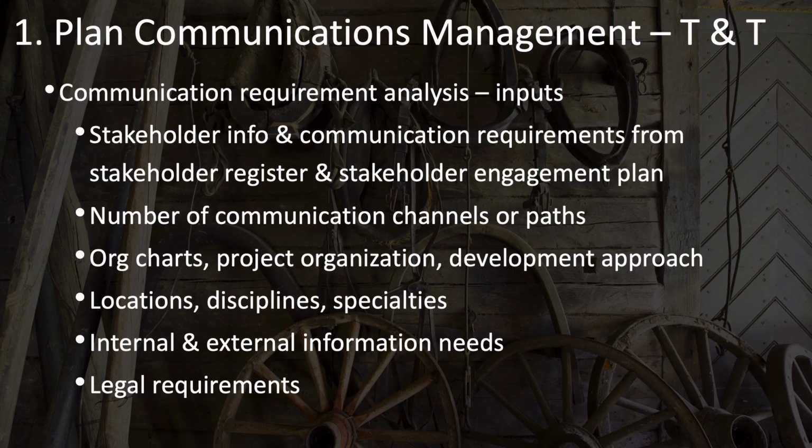Your development approach can also have a significant impact on your communications planning, particularly if you're running an agile project, which has very different communications, especially compared to your traditional predictive approach. With an agile approach, you favor much more face-to-face communication and co-location rather than a lot of written communication.